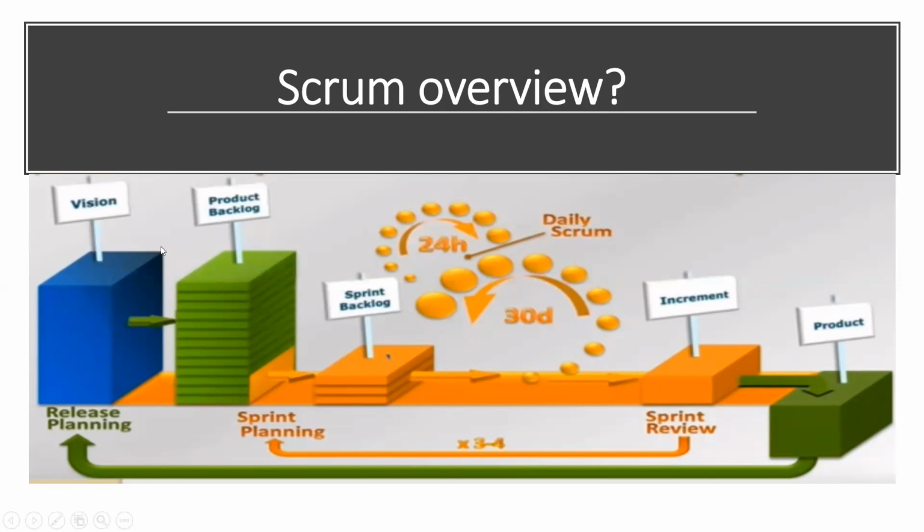On a high level, we split it into backlog items, that is, user stories. These are the epics, we can say a theme or a huge chunk of data or requirements. From that high-level requirement, standardization and normalization take place and it is put into backlog items with user stories. Then from the user stories, we take a chunk of items and put it into a sprint backlog. That means the sprint team will pull some portion of the items, prioritize and plan the sprint with the topmost prioritized items. This is okay.